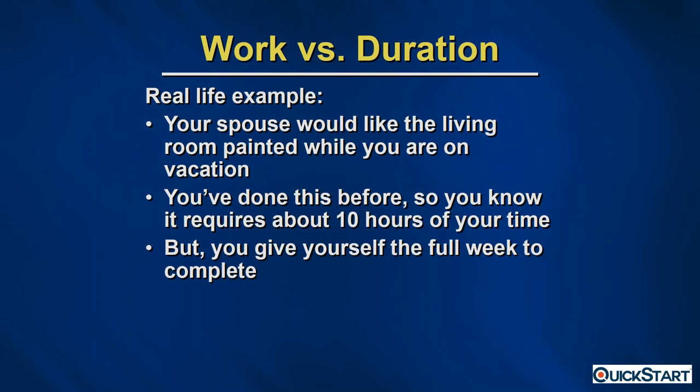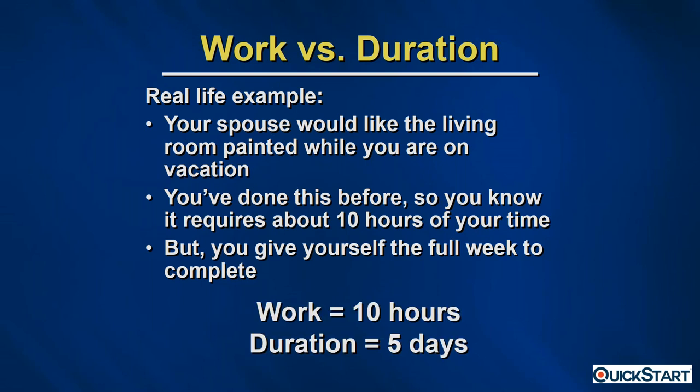Let's use a real-life example. Say your spouse wants the living room painted while you're on vacation. You know it requires about 10 hours of effort, but you're going to give yourself a full week to get it done. In that scenario, work equals 10 hours, and duration equals five days. That's a real-world scenario to help you understand the difference between work and duration.